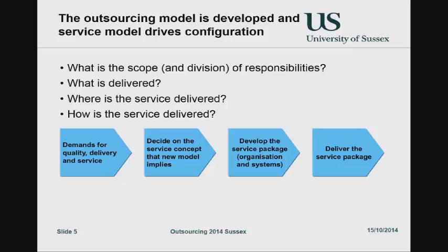Also, in one of the other Unilever operational things I looked at, which involved HP providing some services, in this case mainframe and midframe, they did not have anybody in their organisation, HP that is, who could fully provide that service in South America. Consequently, HP had to engage subcontractors to do that for them in South America.